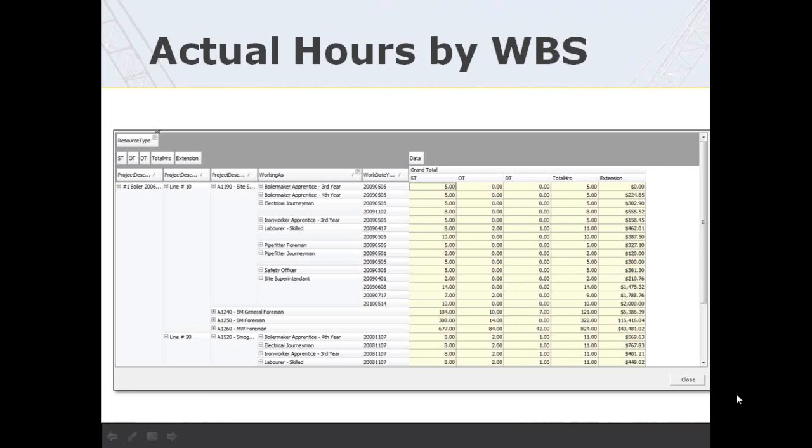And in DTC, we've got mechanisms in place for if you're changing a description in the work breakdown structure, if you're canceling a phase of the job or reallocating hours. We can take care of that quite handily in DTC. The export engine's smart enough to know that these hours have been reallocated, so we need to resubmit them through the Primavera export process to update the schedule with those changes.